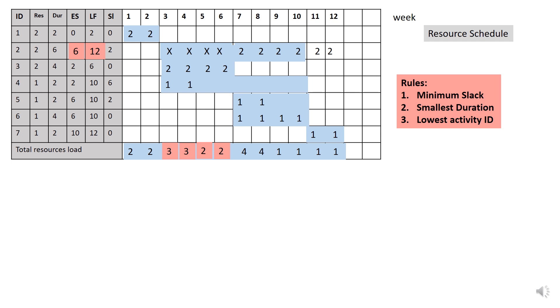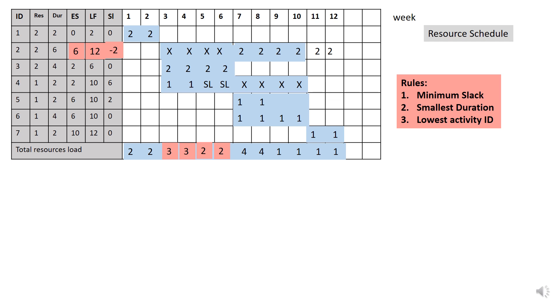So the next activity is activity 4. Since activity 4 requires only one resource, it does not affect week 3 and week 4. However, the slack has reduced to 2 instead of 10 because week 7 to week 10 has been allocated for activity 2. So the new early start and late finish does not change and still remain at week 2 and 6. But the slack now has become 2.